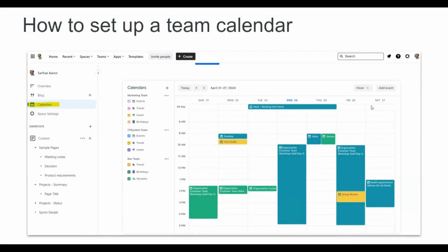And I'll be showing you in this video how to set up a simple page that you can use for your team. You can also add a team calendar. It really helps because by having a team calendar on Confluence, you will be able to add the team's vacation, training, anything like that. So what I do is I make sure that everybody adds all that into the team calendar. So before I start my daily scrum, I always check that to make sure who is away, so that I don't call them out during daily scrum. So everybody keeps the team calendar up to date, and it's a really good way of tracking who's in the office and who's going to be taking off time. So in this video, I'll be showing you just a basic how to set up a page.